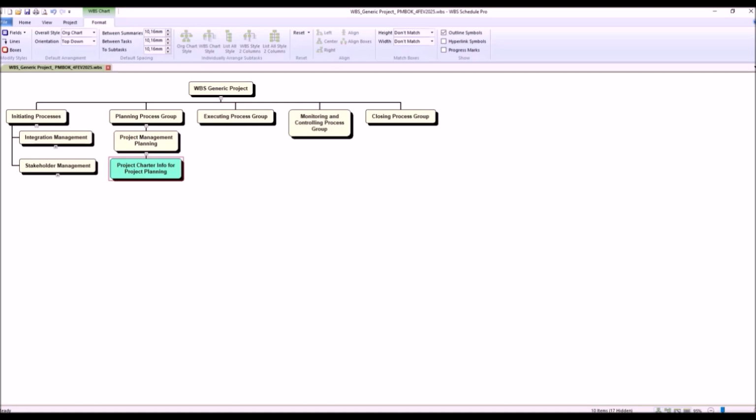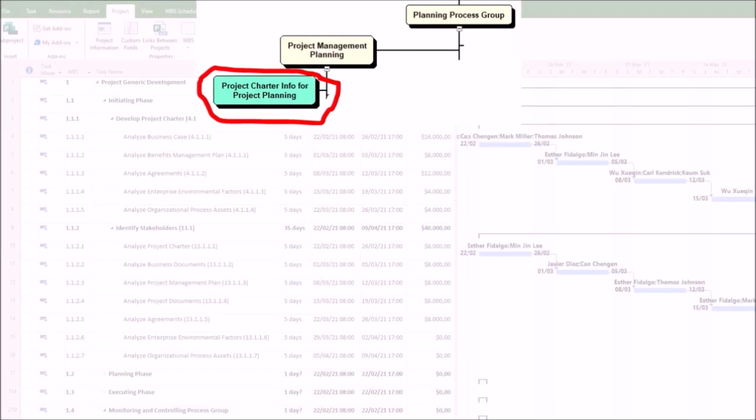1. Formal authorization of the project. The project charter officially initiates the project, giving it legitimacy and aligning it with organizational objectives. It is typically issued by a project sponsor or senior executive, granting the project manager the authority to proceed.